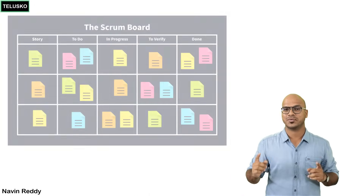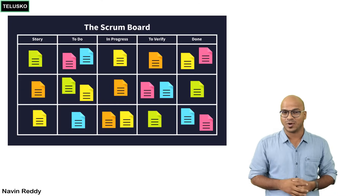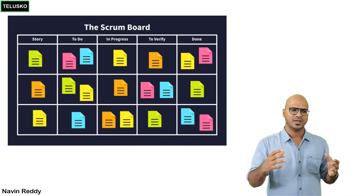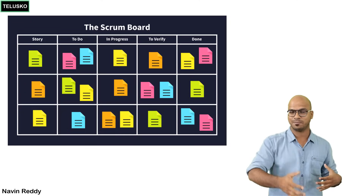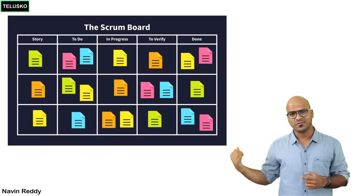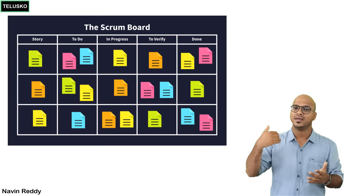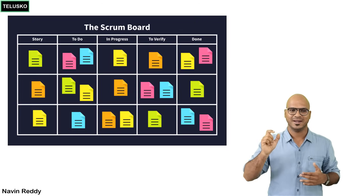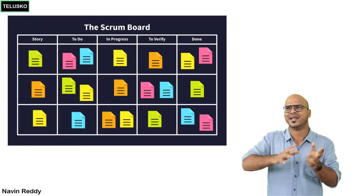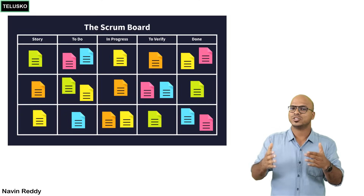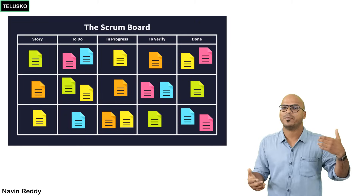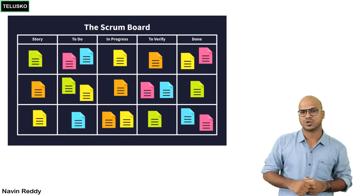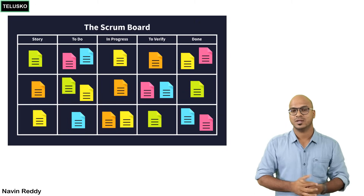To implement Scrum, you use a Scrum Board. With a team of six, everyone needs a clear picture of project progress. The board has columns: the full backlog, a to-do list of what's up next, what's currently being worked on, and what's done. The 'done' definition in Agile means 'done done' — not 75% or 80% done. When you say it's 100% done, it means it is developed, tested, and ready for shipment.